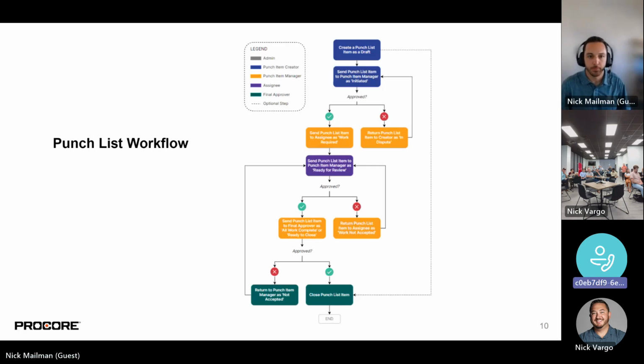But again, a lot of it, we want Liz to talk about in the sub meeting: you guys need to finish all this stuff in preparation for punch list. We feel like we're more successful when we walk with an owner and architect if we just got done. Sometimes just the fact that everything's there is a much better punch list than, oh, that was missing and that was missing. So that's just something to know about how you use the tool.